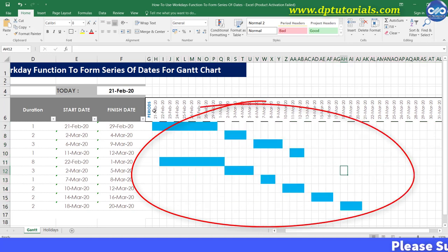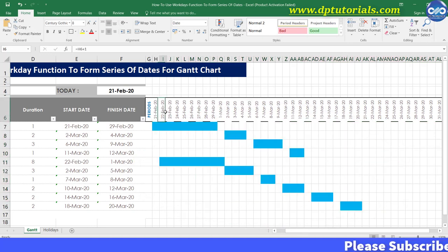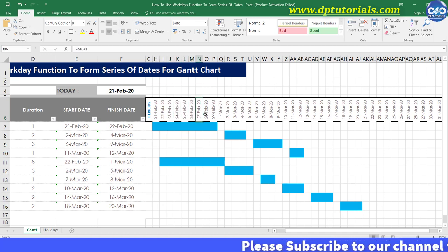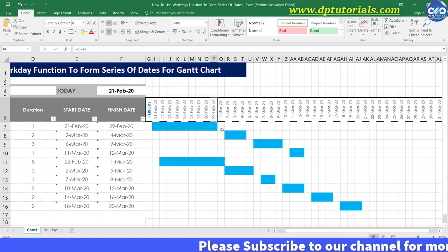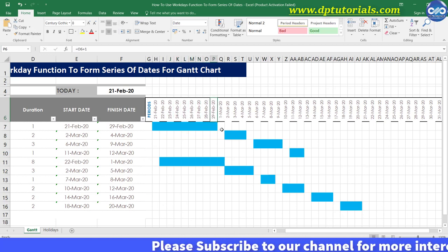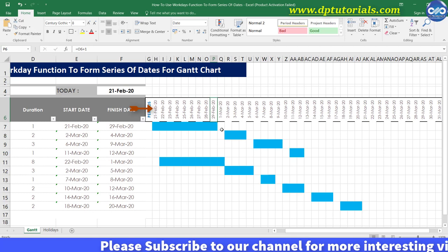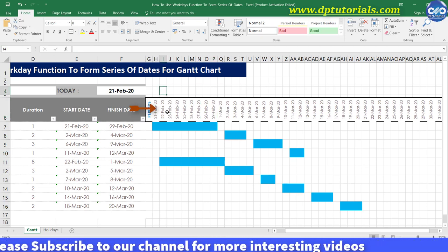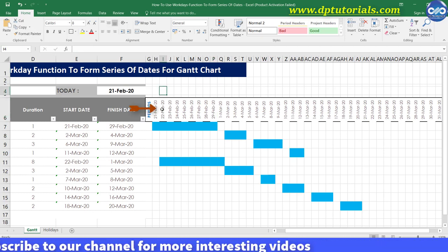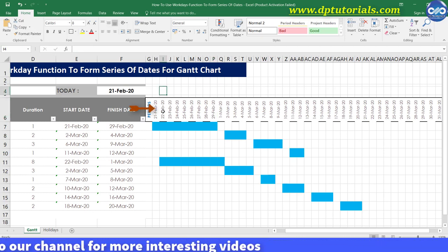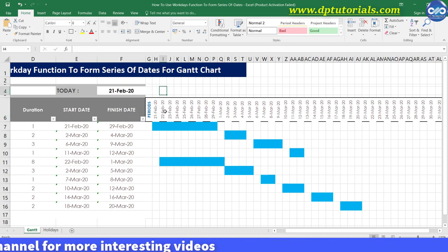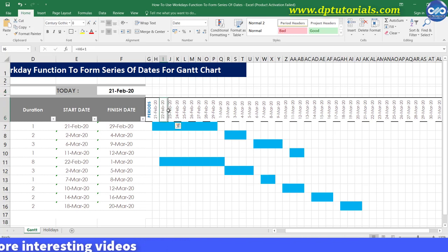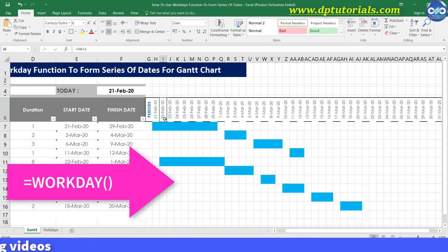Now let us focus on the timeline again. If you want to show only working days that is Monday to Friday rather than showing all days and also excluding your specific projects holidays then you would be using the function WORKDAY.